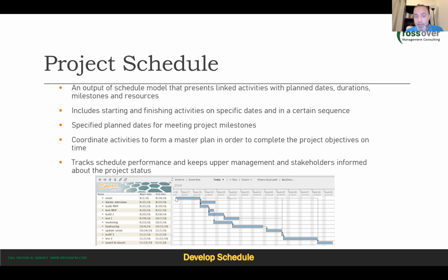Okay, so here you have the activity 1, which is, for instance, here setting the vision. And after this activity, you have 2 activities in parallel, right? So this activity that takes, for instance, 3 days, and this activity that takes 2 days. And then you have another activity, okay? So you see there are here relation arrows that indicate the relationship and the dependency between those activities, and that create a sequence, right?